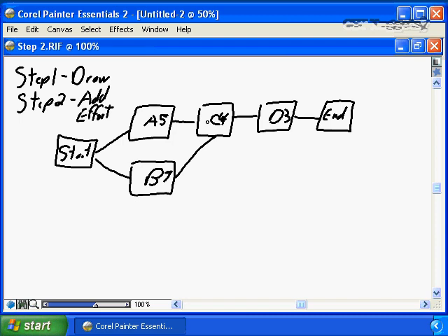It can be resource number 1 because they're available from A. It could be resource number 2 because they're available from B. Or it could be yet a different resource based on the skill requirements for the project. But again, based on 100% availability, 100% utilization, it will take 4 days worth of effort, 4 days on the project to complete C, and the same applies to D, which is 3.